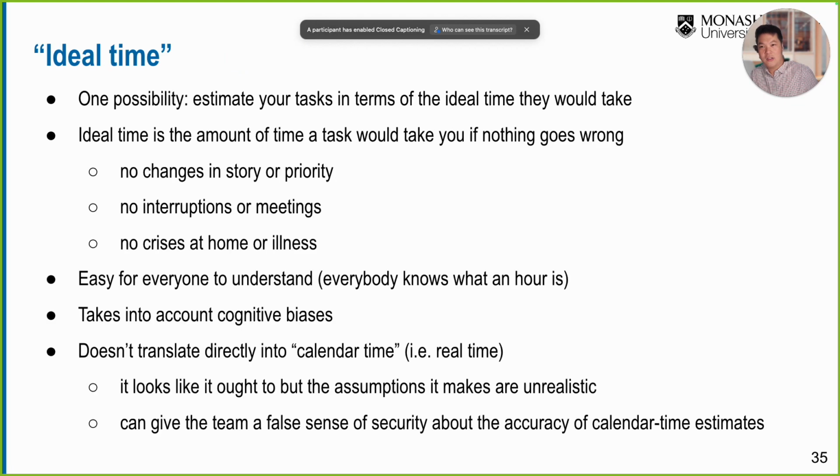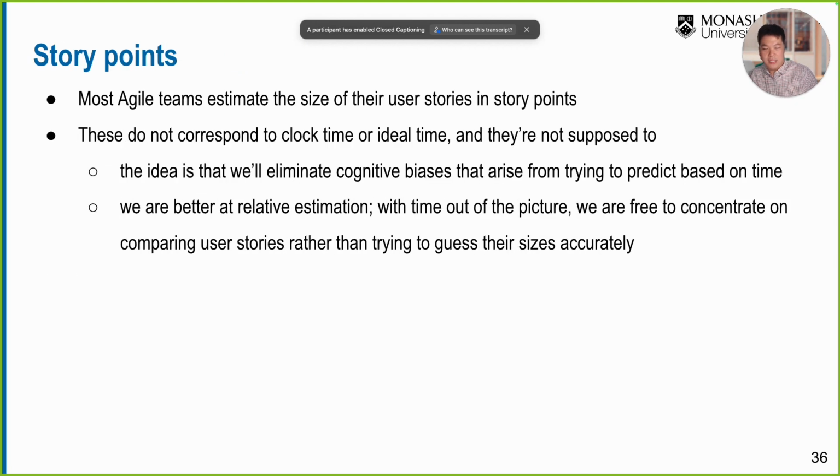So yeah, I'm gonna talk about the technique here. As I mentioned, there are so many units of measure, right? Man hours, lines of code, the amount of lines of code to implement or whatsoever, but that's the absolute estimation. We're going to talk about the relative estimation, which is called story point. Most agile teams measure the size of the user story as a story point, okay?